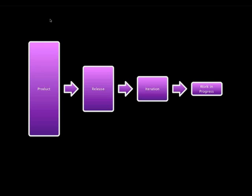Another tool you might want to check out is rolling wave planning. Rolling wave planning — we start with large chunks and start breaking those chunks down. Think about waves crashing on the beach — you have a small wave that's crested and then large depressions in the sea. Our product is very similar: at the vision level, we know we want this big picture item, then we start decomposing it as we go along. The point being there are lean solutions to the product ownership role.